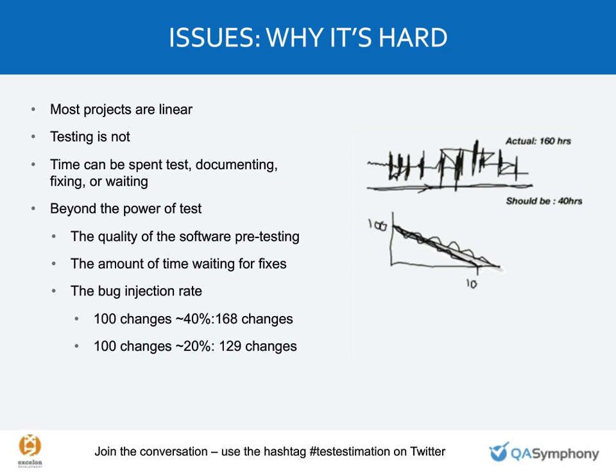Yeah, so if you look at the actual work in testing, a lot of that isn't spent either hands on a keyboard and mouse or in the IDE testing software. There's a lot of work that wraps around it. There's an acronym that I've heard, I forget where it comes from, that describes the work a little better: T, B, and S. So you have test time, which is the amount of time you are actually testing the software. B is for bugs. That's all of the follow-up testing you have to do around a bug and the time it takes to report. And then S is setup, which is all of the work you have to do in order to get to the stage where you can test.